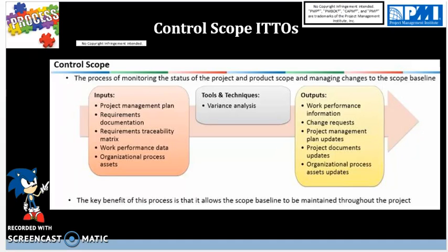However, frequent change requests in scope will result in project failure with a burnt-out budget, prolonged timeline, drained team resources and disgruntled stakeholders. So keep that in mind. Having too many change requests is not good. But if we have to have a change request, as we had talked about earlier, this will have to go to the Perform Integrated Change Control process to be approved or rejected.